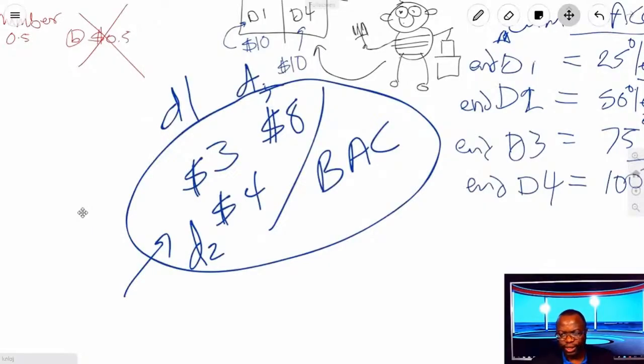Ashish says, please, Phil, explain 7-12. Devon said, you said units of measure for variances and none for indices. Always wonder when to use units of measure and when not to. So for variances, you use, of course, a $ sign. For indices, no $ sign, just a plain old index. It's an index, that's all it is.